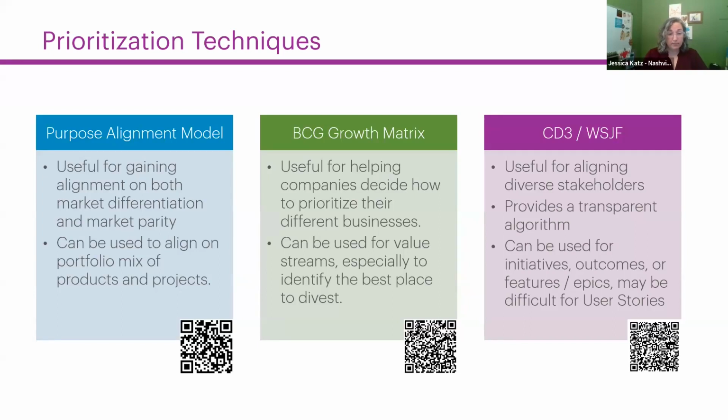I have used it before at the story level, and we dropped out things like risk retention and opportunity enablement, and we just went with perceived business value and time criticality as our top end of that. So you may have to alter it to achieve that at the user story level, but it can be done. It's just, it might be difficult. Does that help? Cool.